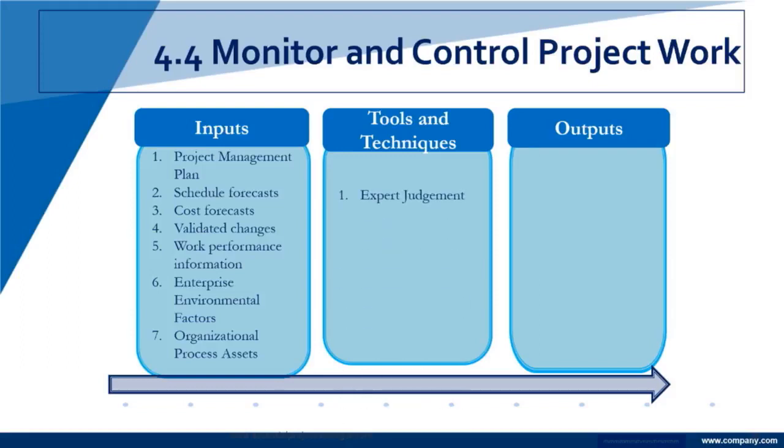We use our expert judgment here, as well as any analytic techniques. If you have a project management information system, then of course it would be vital to have that as a tool as we're looking at this work. And of course, meetings. We always have meetings. We have change requests that can come out of this work, where people are identifying where scope has changed, where additions have been made, where budget has changed, where the schedule has changed. And there's a lot of different things that can come up as we look at the work.